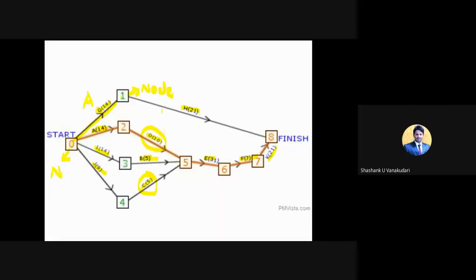And third step is, once we fixed the different types of activities and the durations for that, now we need to provide the dependency between those activities, right? So here you can see activity A, for that the next activity is H. Clear? Can you see this? For A activity, by considering this particular path, the next activity is H activity, right?